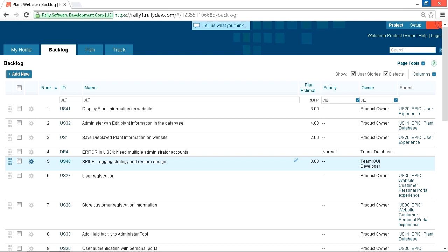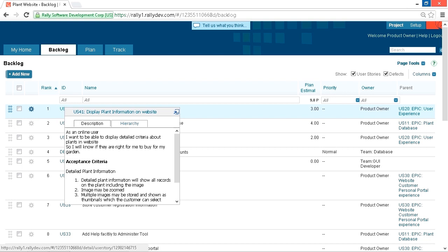Now consider, each PBI holds the requirement of what must be done, and the product owner has the responsibility of prioritizing the PBIs, with high priority items being at the top, and these are the ones that are moved into the sprint and added to the product increment. This means the product owner has the power to dictate what small slice of functionality will be added to the final product in each sprint. And each of these slices of functionality are fully described in a PBI, which includes acceptance criteria on when the development of the item is complete.